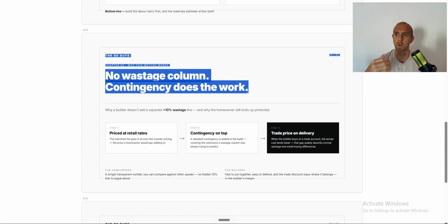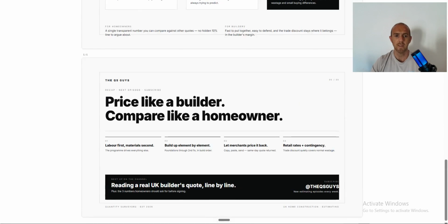And by the time the builder gets a discount on the retail rate, we're well under, and then we're putting markup above. So the builder's cost is here. We've priced it at this. There's a bit of fat here, and then we've also put a markup on as well. So there's a huge jump there, okay? Typically, I'd like to see 20 to 25% there, and that is just an added contingency for the builder, and also good negotiating room if the client is trying to bring him down as well, okay?